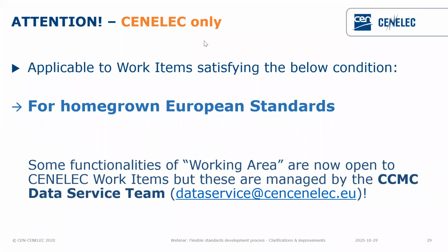I guess that the case could be that funding has not arrived, but be careful, because once we committed to respect that standardization request, and in addition we have signed a contract, these are the deadlines that we have to respect. So if you can take the one change option, you can take the tolerance, but make all the calculations well to meet the deadlines in the standardization request.